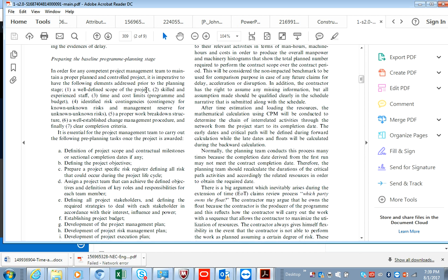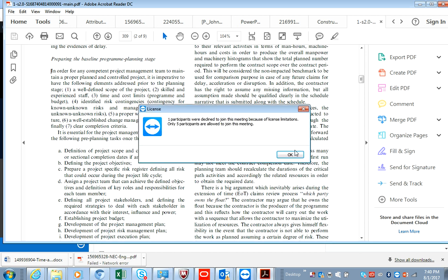You talk about the durations, you talk about the deliverables, you talk about deliverable requirements as well, scope in, scope out. All of the sheets on the scope need to be defined, every single bit, and then you highlight activities that go with each of the scope. So it's sitting down with all the responsible parties who are going to perform those tasks, and then you further disseminate it into activities, basically.